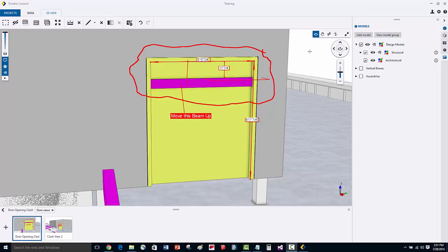Now, if we'd like to take this a step further and actually assign this to a task or a to-do to a specific group that needs to have a status and show a commenting thread and when it's completed, then we're going to go ahead and use the to-do feature here. The first thing we're going to do is go to the To-Dos pane. We can do this by selecting the third icon down on the toolbar here towards the right-hand side of our screen. We can currently see that there are no to-dos created on the project.